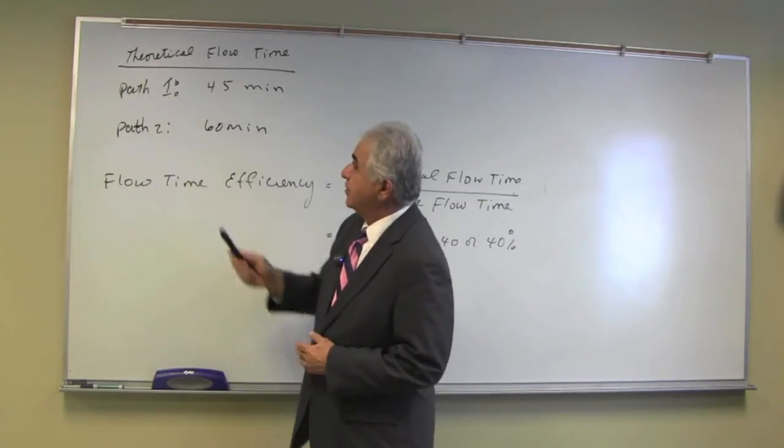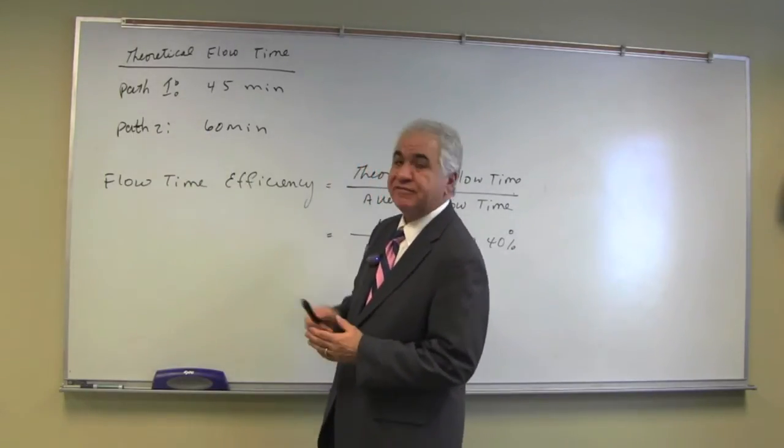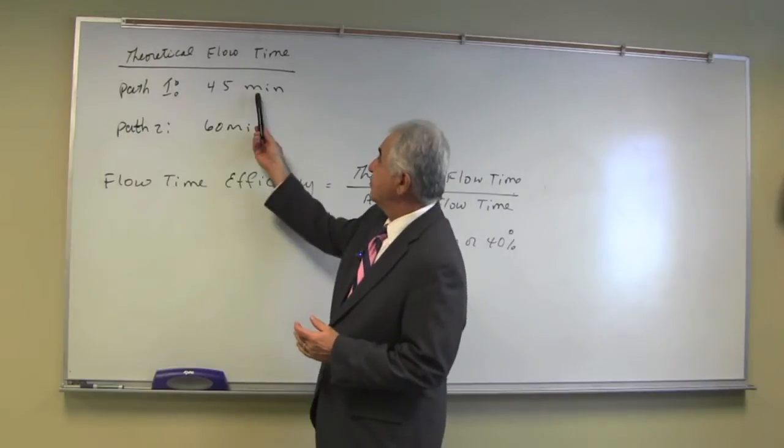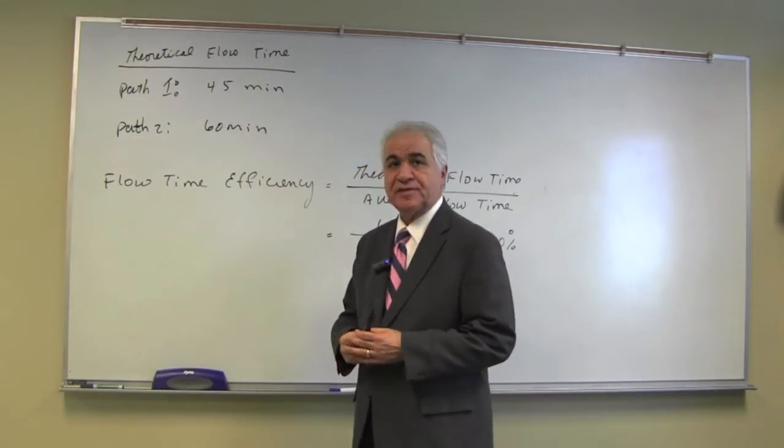For path one, the theoretical flow time, which is the sum of activity times on that path, is 45 minutes, and path two is 60 minutes.